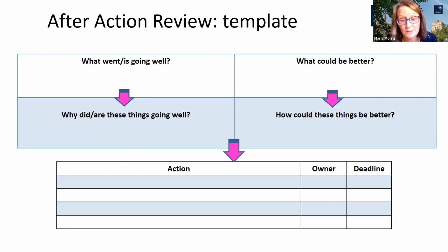Getting a more neutral facilitator might be a good idea if what you're reviewing is particularly contentious in any way. The key thing to remember as a facilitator is to ensure everyone has the opportunity to participate, including quieter members of the group, to keep to the allocated time, to define ground rules like openness, equality, confidentiality, and a focus on learning and continuous improvement.